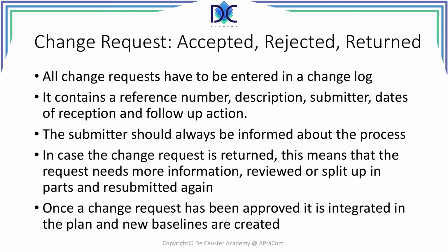The submitter should always be informed about this process, should get the reference number and the other information. In case the change request is returned, the submitter may have the chance to review the change, add more information, and send it back for a new review.